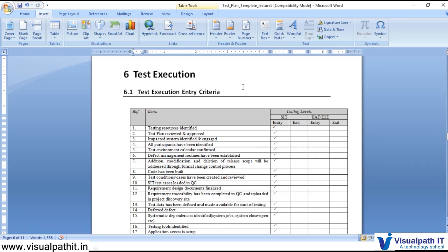But if the smoke testing fails, like the important scenarios and flows are blocked due to a SEV1 or SEV2 defect in the smoke testing phase itself, then we are not going to move to functional testing, and we have already listed those conditions here. So that's why it's important.